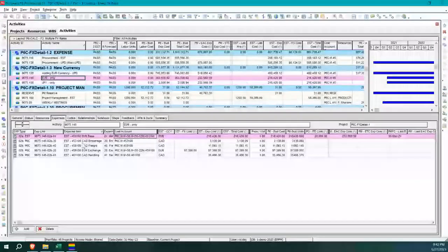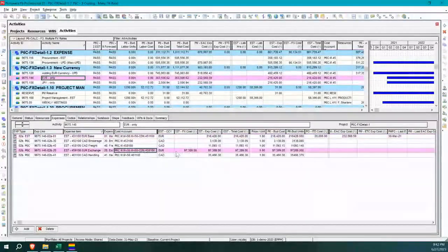Awesome. Okay, so what it did was it figured out the brokerage, freight, exchange, and handling all off of this dollar amount. Now the exchange rate is the difference between buying this in Canadian. And so we've got the exchange rate, and you can see that it's putting it in its own column, so we know exactly what is contributing to exchange rate costs.